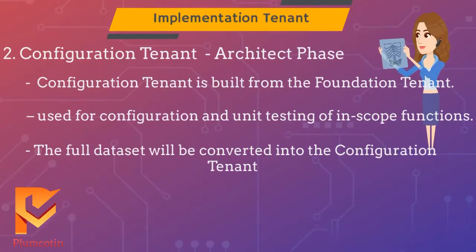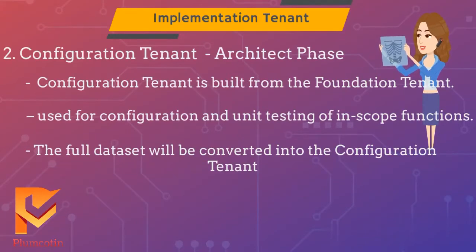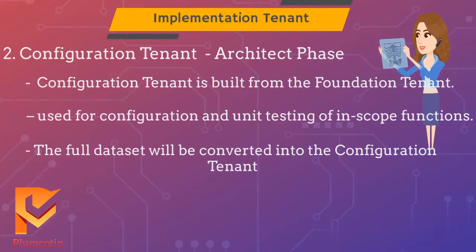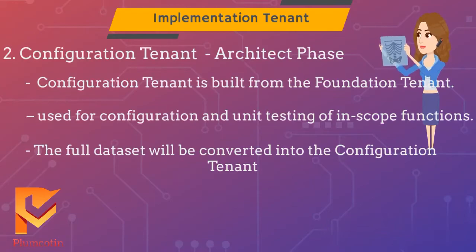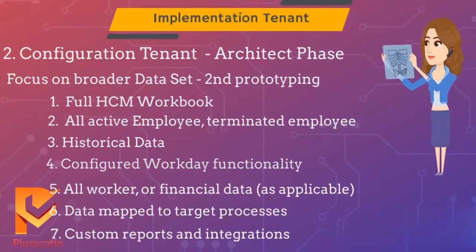Configuration Tenant. After the Business Process Workshops and Design Sessions, a Configuration Tenant is built from the Foundation Tenant. In the Architect phase, this tenant is used for configuration and unit testing of in-scope functions. The full dataset will be converted into the Configuration Tenant, and it is expected that some data gaps or issues will persist for this conversion. In the Configuration Tenant, the team focuses on a broader dataset — this is the second prototyping.